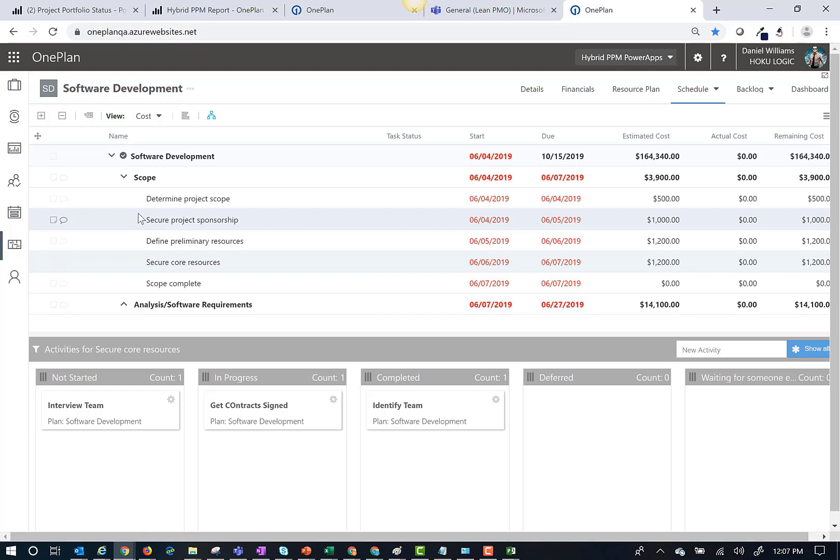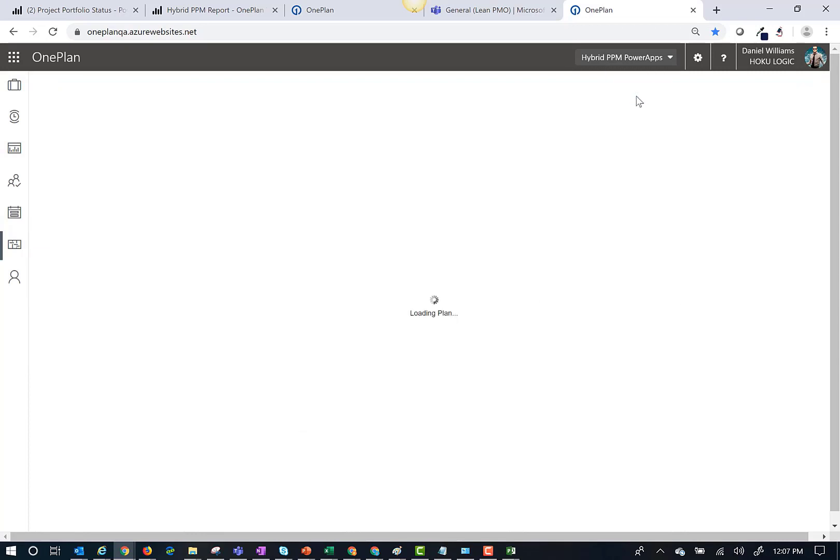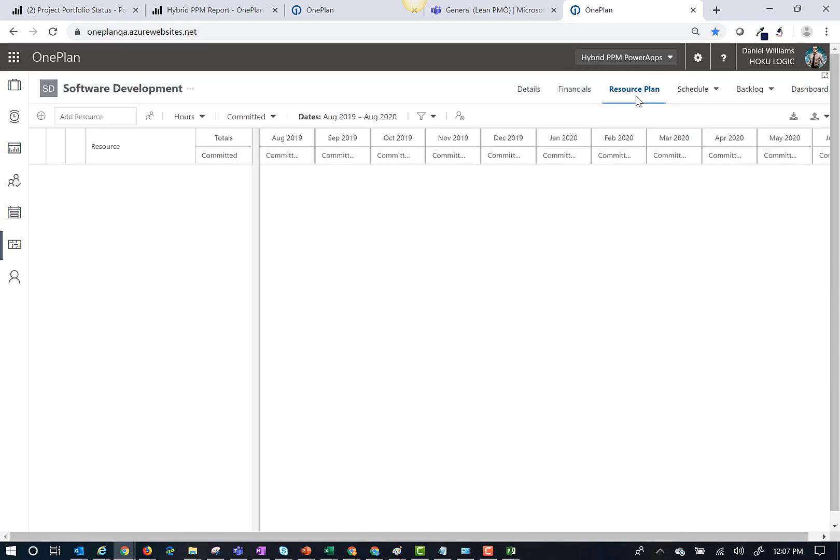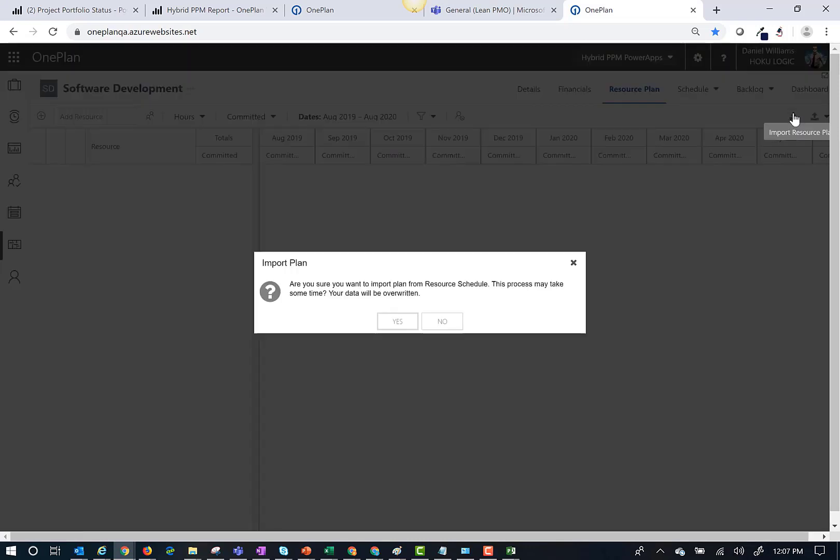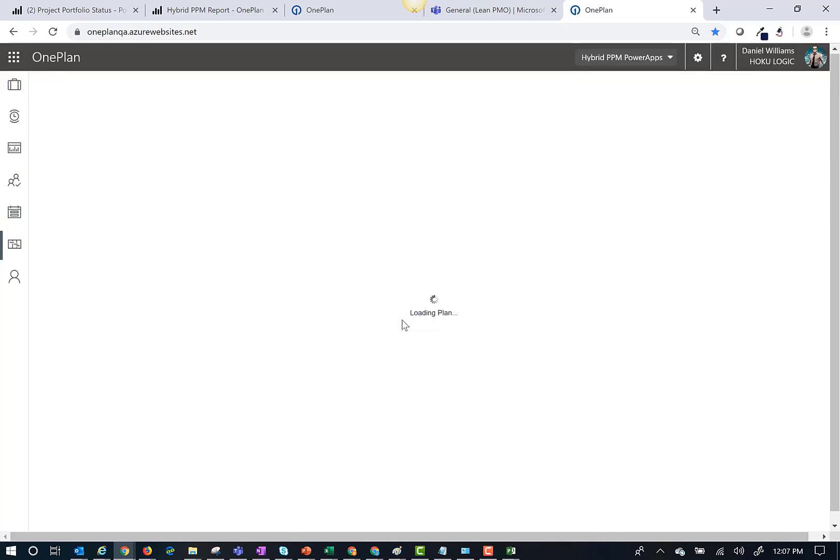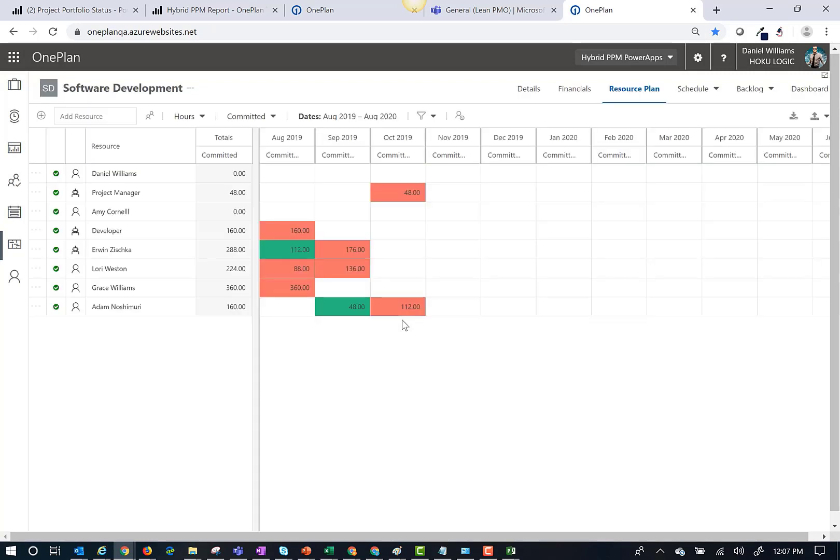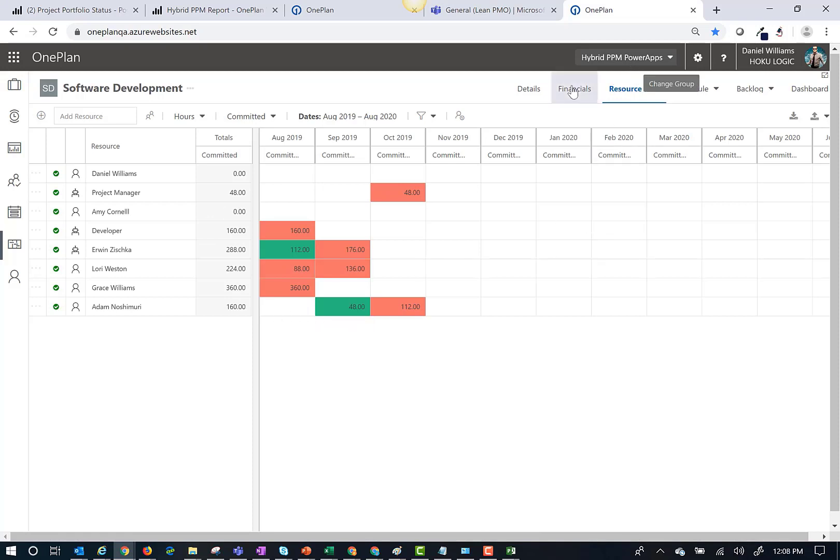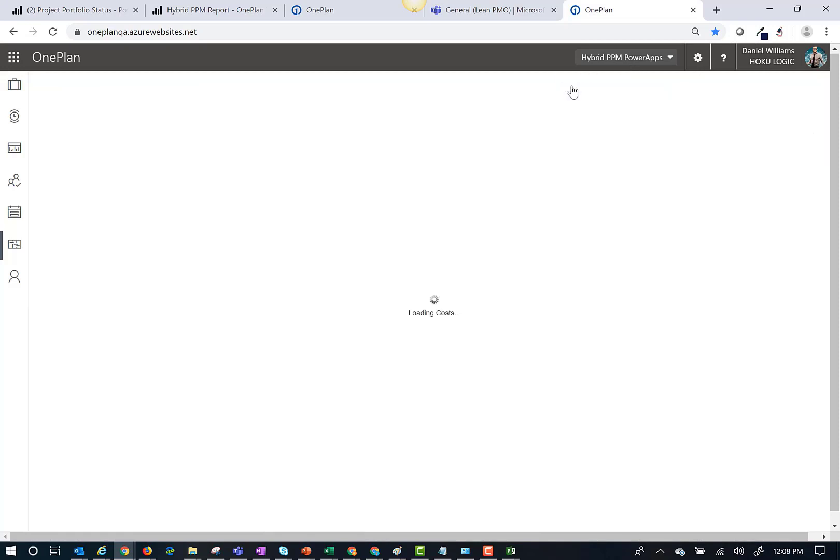If I was using OnePlan to manage resource capacity for portfolio selection and capacity planning, click on resource plans to view the capacity plan. Now I can either add resources manually, or you can click the import button to populate the resource capacity plan from the schedule.